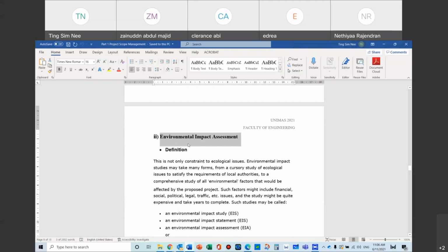Here we're not really talking about the environment as in flora, fauna, groundwater pollution and air pollution. It's not that. We're talking about the project environment, which is very big. Imagine a very big circle with your project in it. Outside that circle there are many layers of environment. If you have one dot as the project, the first layer will be the company, the second layer will be the local issues, and the third layer will be national and international issues. This is the environment of the project.